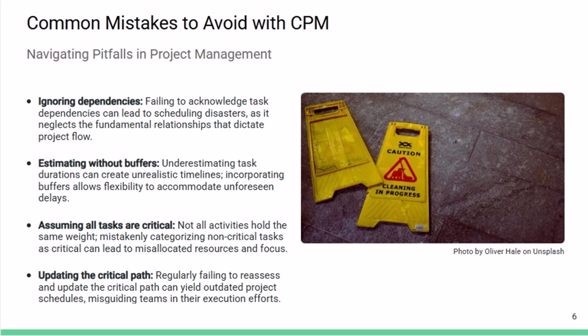The third mistake people make is assuming all tasks are critical. Always remember, not all activities hold the same weight. Mistakenly categorizing non-critical tasks as critical can lead to misallocation of resources and the focus of the team members.